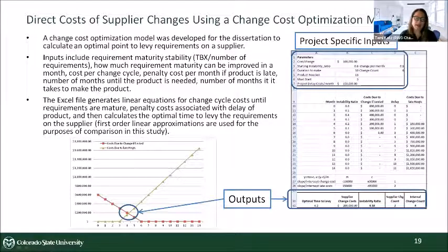There's also a cost impact of giving them the work too soon and putting them on contract to requirements when they're not quite stable. And when I say not quite stable, what does that mean? Well, the idea here is, how many unknowns do you have? TBXs. How many unresolved? How many to be determined? And when that's pretty high and you put a supplier under contract, what you're ultimately dealing with later is removing those over time through a series of changes you're going to give them.